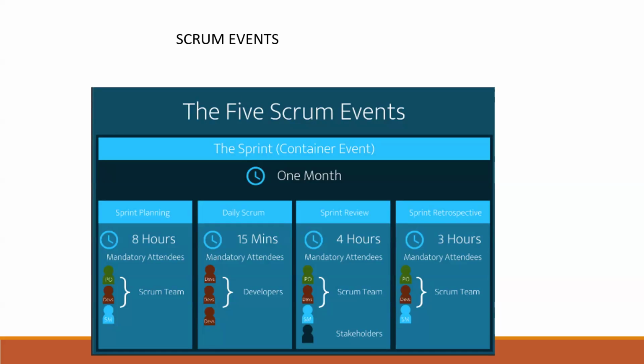But there are three questions which are to be answered: what you are doing, what you have done, and what is blocking your work. Those are the things which will be discussed in the daily scrum.